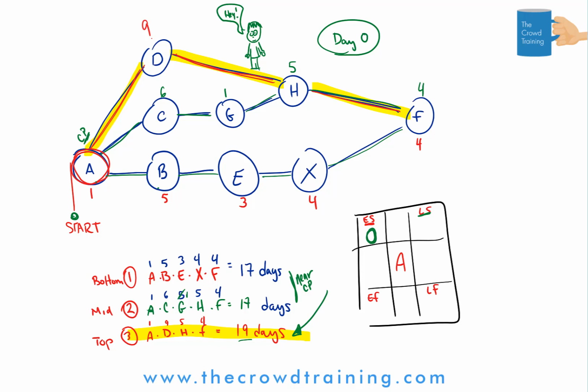And in that case, there is no time to waste working on A because everything on the critical path is also waiting for it to be done. Hence, the latest it can start or should start in terms of project management, schedule management, is 0.